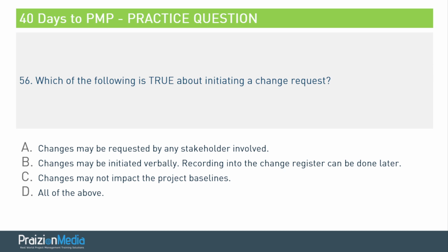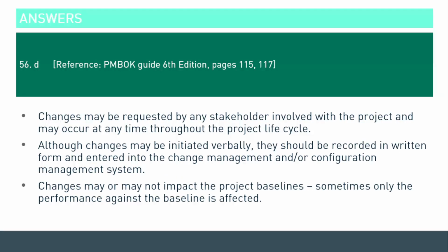All right. So taking a look at these, what you'll observe is that all of these statements are correct. Changes could be from any stakeholder, they could be initiated verbally, and they may not impact the project baselines. So there's a fallacy going on that if changes don't impact the baselines, then you don't need a change request. That is not true. Okay, so the answer to this is D. And those are the pages to refer to. Here's your next question.